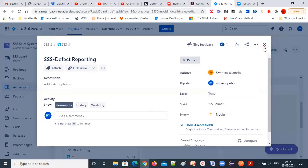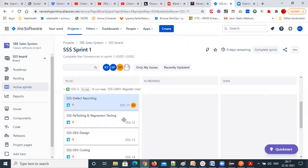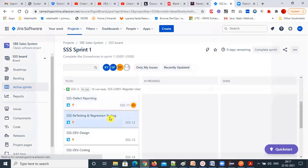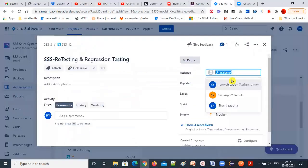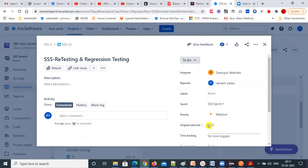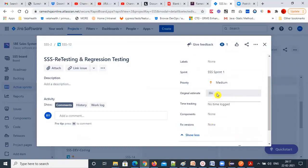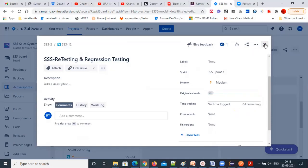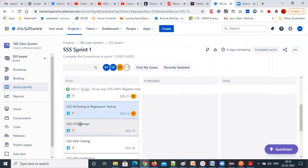The time given is to complete the task — the estimation is how much time you need to spend. In the sprint planning meeting, the team will decide how much time is needed for each task. For example, 'we will give two days for regression and retesting.'